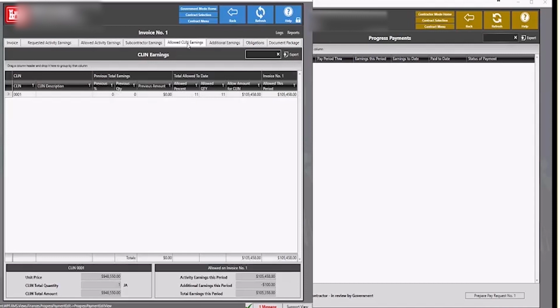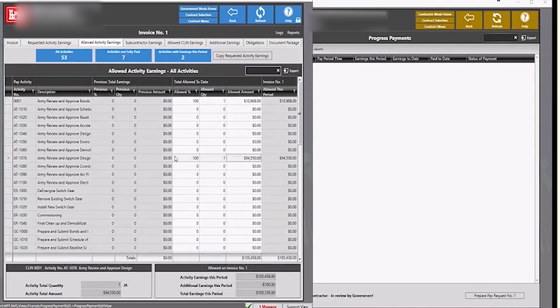And that's how we would change those. The reason why we want to change those is, say we're negotiating, not really negotiating, but you kind of do this. You have a conversation with the contractor. Every time you're about to do a pay request, you walk the site, or you've looked at the site, or whatever your deliverables are, you've reviewed them. And based off of that, you go, you're asking for 100%, but we don't have any test results, or if you're actually not done, you forgot about this big old section over here. You can reduce that by a percentage or by an amount, and that quantity that would actually be billed can be changed in that location there.